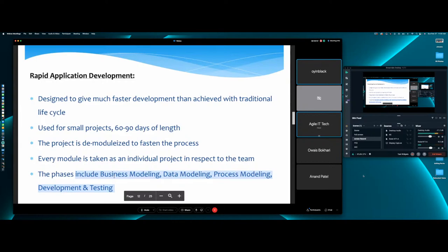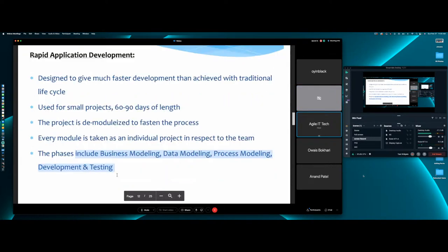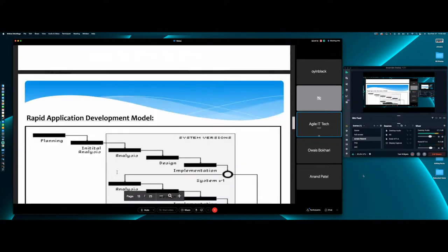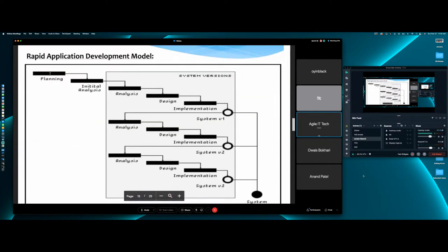All right. Well, boys and girls, we don't have 18 months to build this car. We need to build it faster. Business wants this to be delivered faster. So what will we do? We will try to apply a RAD method of delivery. RAD will do the initial planning, just like we just did, and we identified 6 components of the vehicle. As part of our initial analysis, we said if we were to build this in a traditional one-team manner, it would take 18 months, not going to work, right? 5 team members, correct.